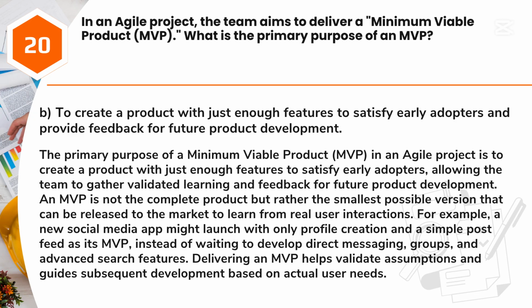For example, a new social media app might launch with only profile creation and a simple post feed as its MVP, instead of waiting to develop direct messaging, groups, and advanced search features. Delivering an MVP helps validate assumptions and guide subsequent development based on actual user needs.